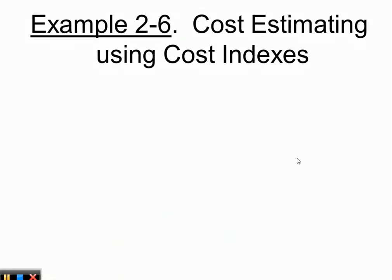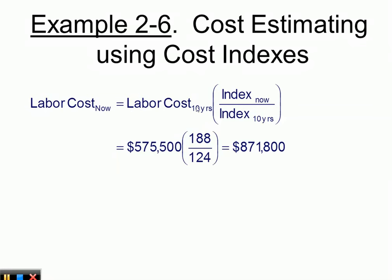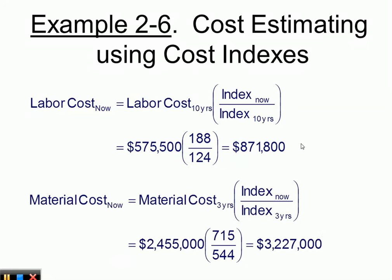Here are two examples using cost indices. For labor costs: multiply the labor cost from ten years ago by the ratio of the labor cost index now to ten years ago to get the current labor cost. For material costs: multiply the material cost from three years ago by the ratio of the material cost index now to three years ago. Plugging in the index values gives the estimated current costs.